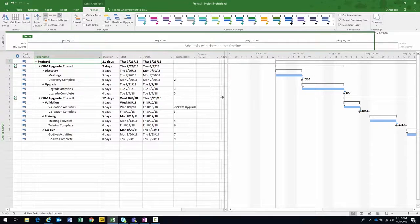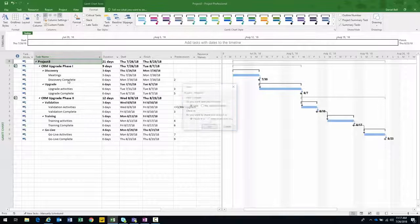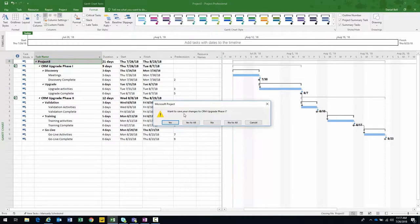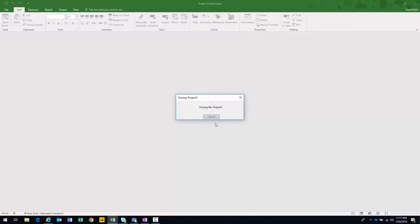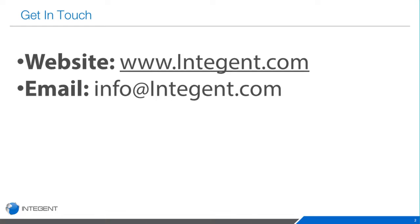I went ahead and created the temporary master project again, giving me the benefit of seeing the entire project schedule in Project Pro. When you exit, choose not to save — that's the temporary master — and determine whether you need to save Phase One or Phase Two individually. And that's it. Hopefully you learned something about intra-project dependencies. If you have any questions, reach out to us at info@antigent.com. If you have video suggestions, feel free to let us know. Thanks and have a great day.